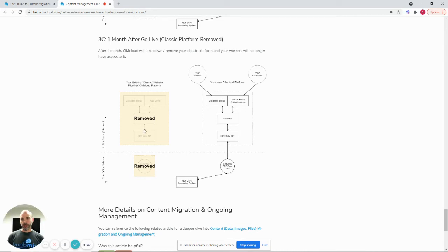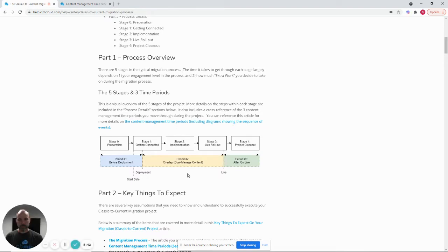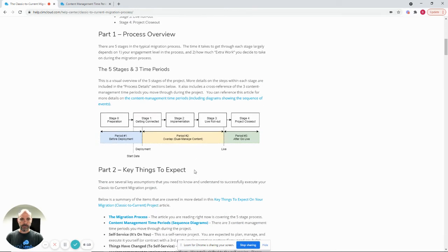So you are in a mode where you're running dual platforms for a period of time. So going back to this process, our recommendation is you stack the deck on the preparation stage before you start this overlap period, to make this overlap period as short of a time as you can calendar-wise, to make that process as painless as possible as you're going through it. It's still a project. There's still some pain associated with going through this. We believe the benefits are strongly in your favor of getting to the new platform. But it's just work to be aware of as your team is planning the work.